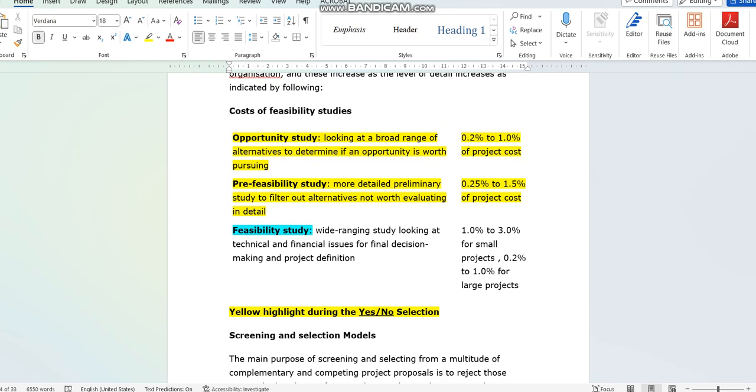It could cost you, depending on what you're doing. If it's an infrastructure project, you may need to do social studies, economic studies, environmental studies, and also legal impact studies. Each of these studies can easily cost like 50,000, and some are counted based on project cost, 1% of the project cost, which is quite a lot. If you talk about 50 million, 1% is a lot of money. So it is important, but it's also expensive.